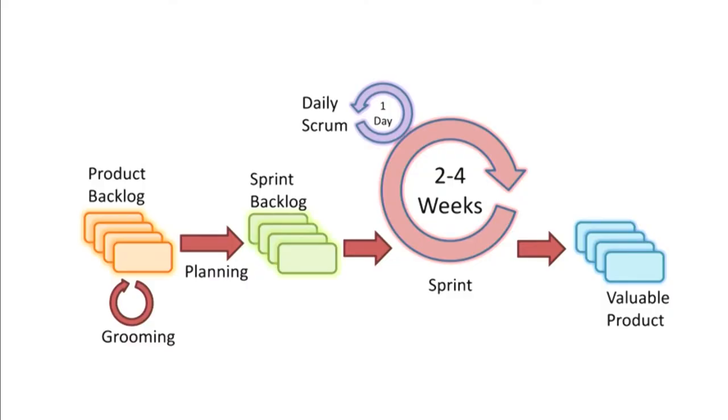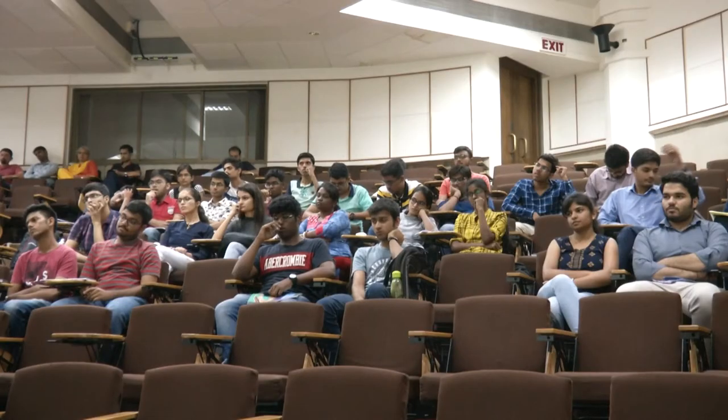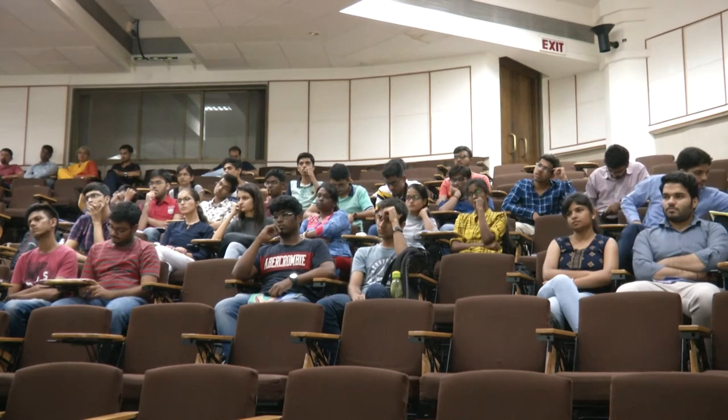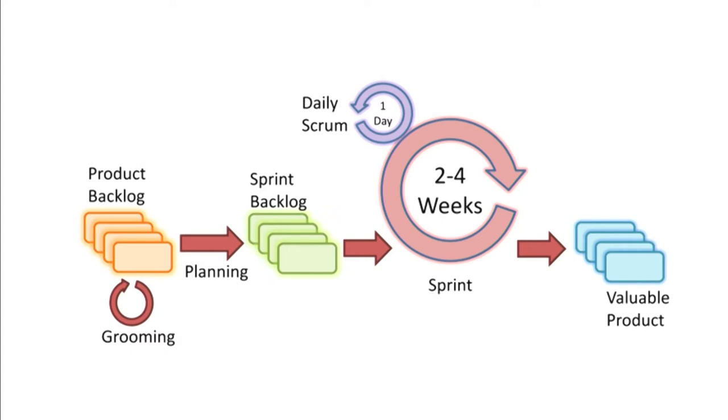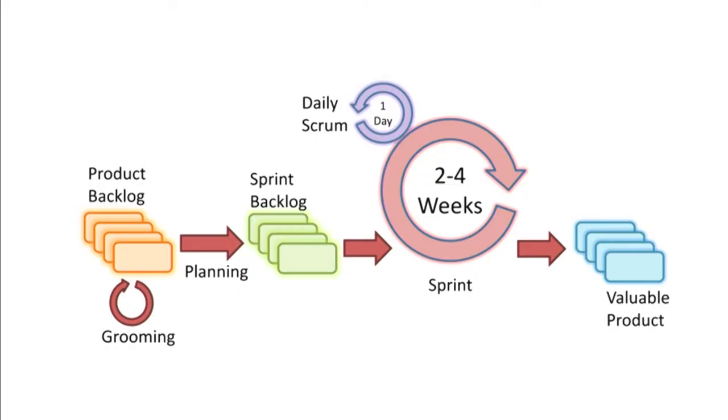If you want to develop a tourism website, you come up with a set of tasks needed to build it. As a Product Owner, you create a product backlog. You continuously groom and refine it because you may not come up with the complete set of tasks immediately. Then you prioritize which tasks need to be done first and keep them in priority order.